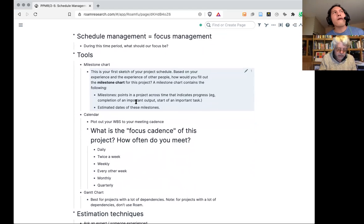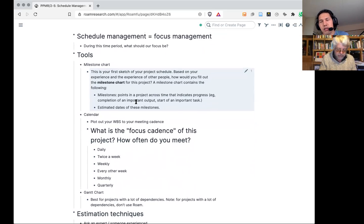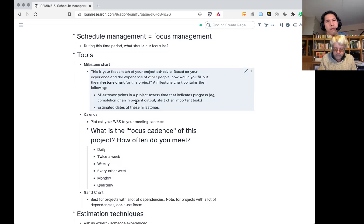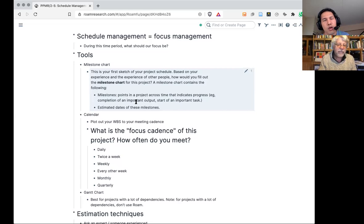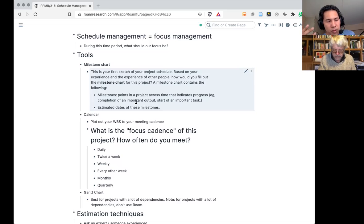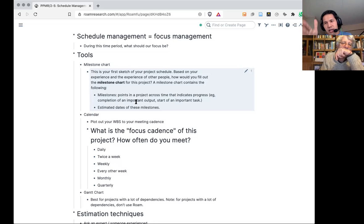The milestone chart is something we talked about during the discussion on the project charter, because it's a tool for presenting an overview of the project. You could use it for your pitch, for a high-level presentation, or to give your team a high-level view of what will happen in the next weeks, months, or years. My usual format is a table with one column showing milestones — milestones are specific points in the project, not tasks or work packages. They're like a completion of a work package, a gate, an arbitrary location project-time-wise that just gives people an idea of where you are.